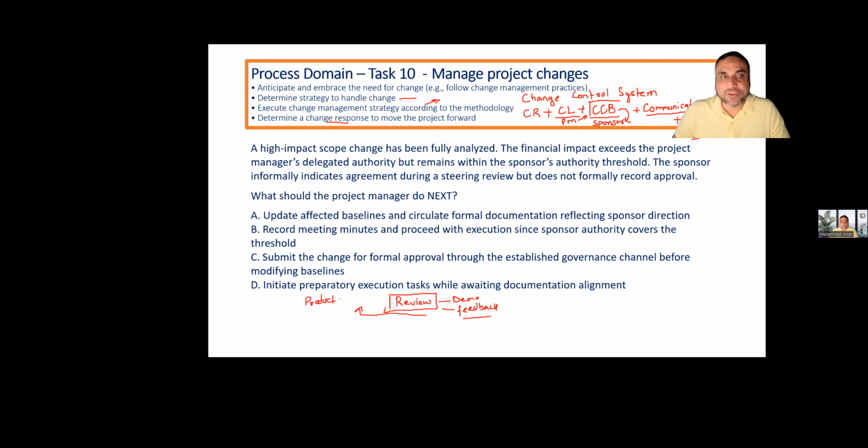Once new or updated requirements come to the product backlog, it is called a groomed product backlog. Groom means something is added, something is removed, or the backlog is reprioritized, which means changes have been reprioritized. So it can also be called a reprioritized product backlog.